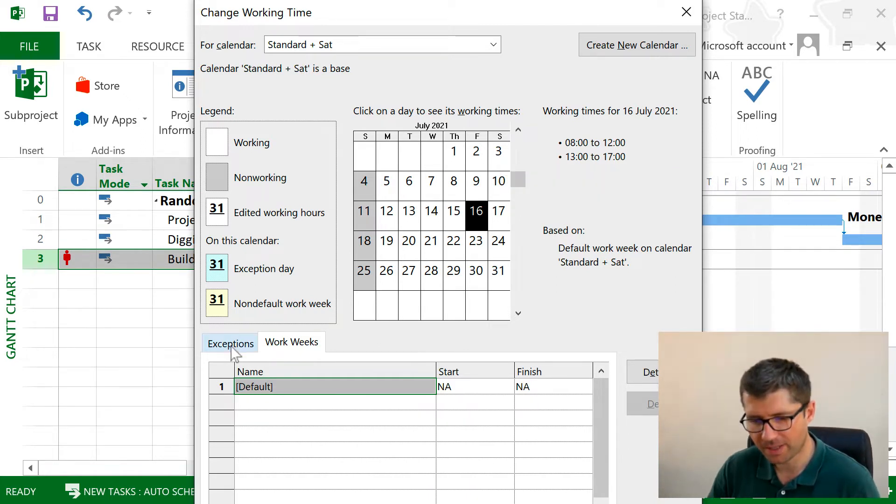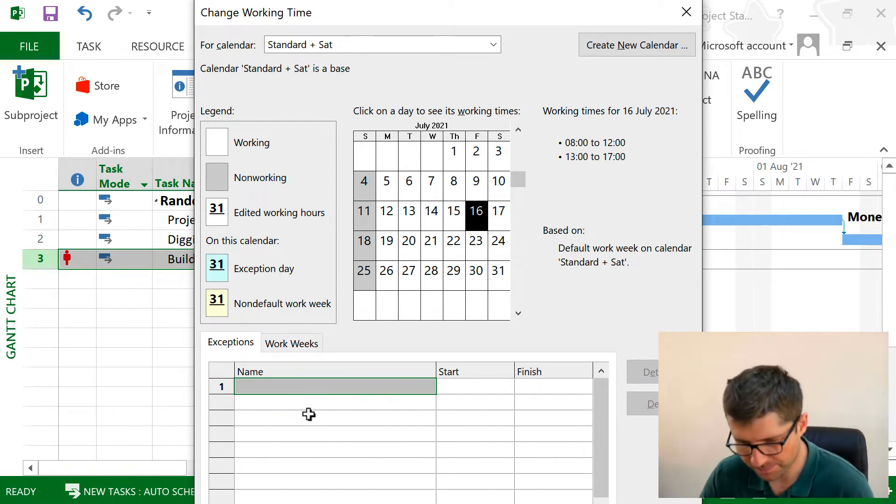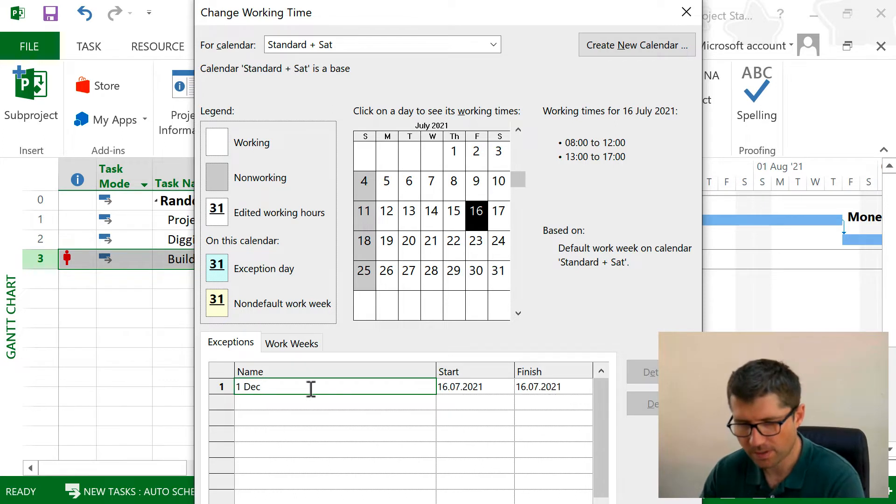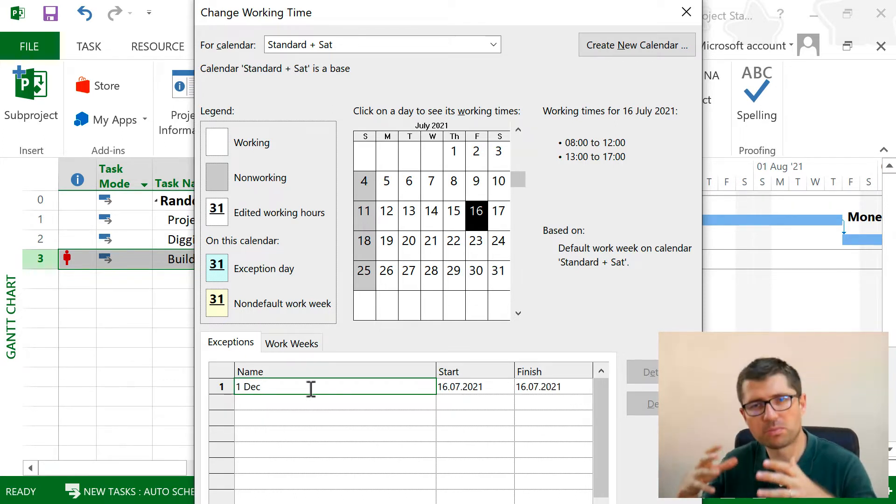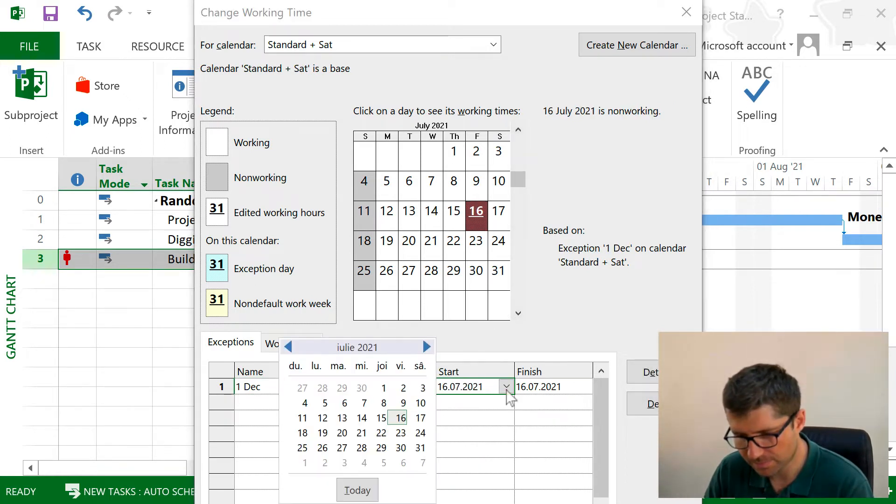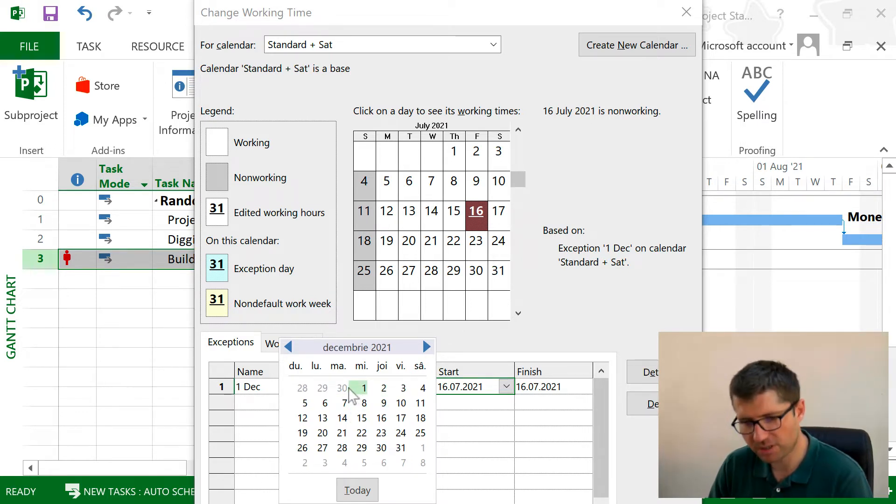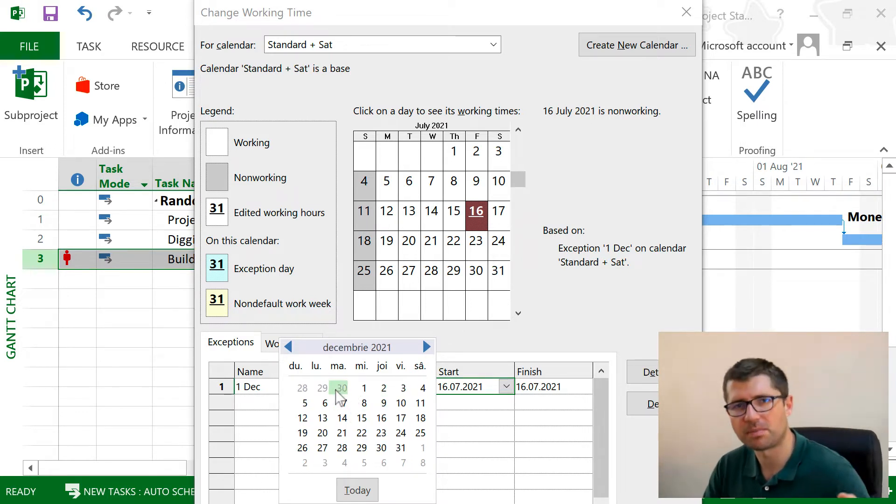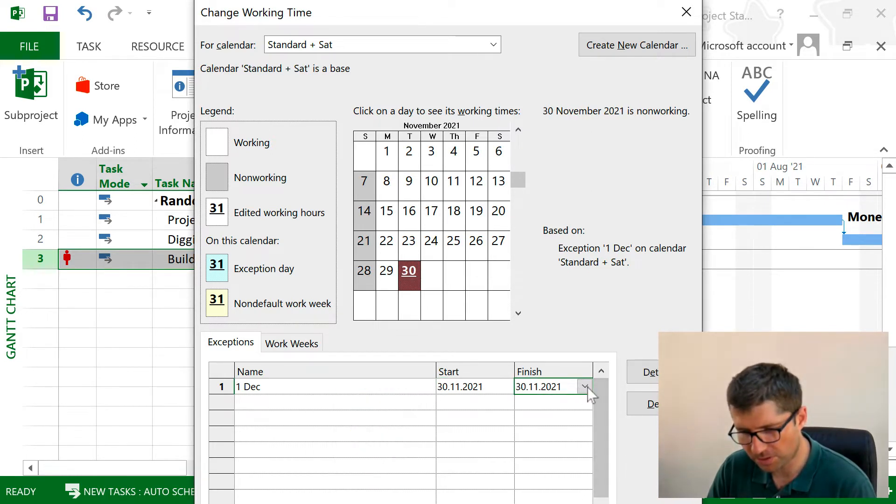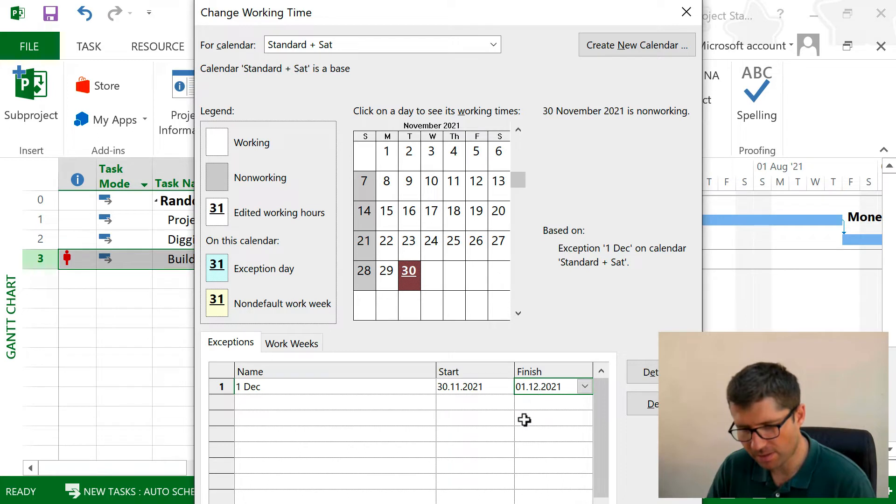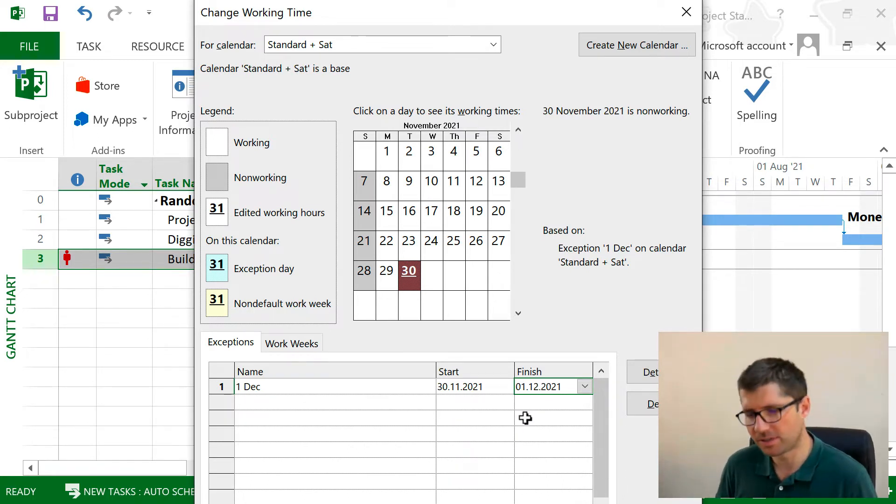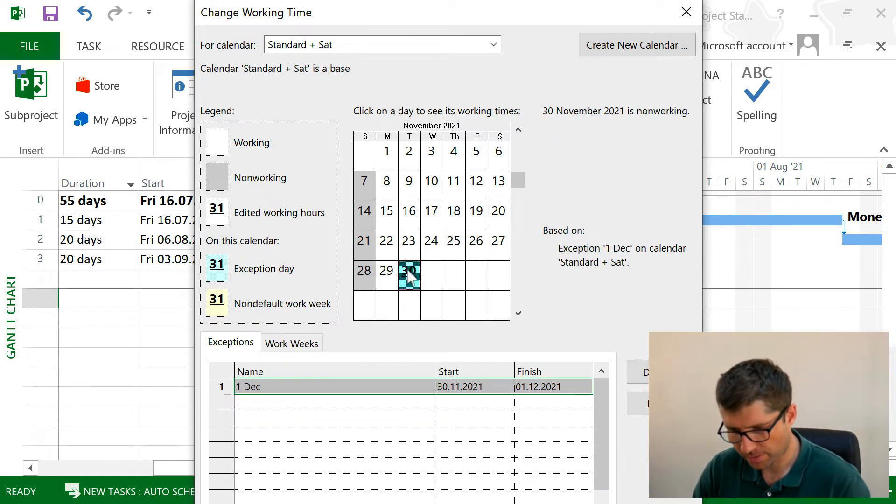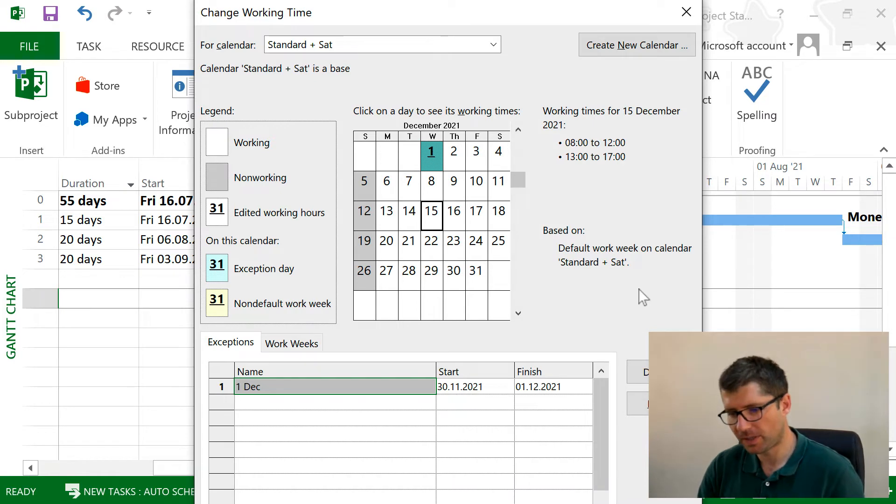The second one is to take into account the bank holidays. For example, in Romania, the 1st of December is a day off, so I want to make sure that this day... let's say 1st of December. I'm gonna put here two days of non-working time, 30th and the 1st. So this is how you can also set bank holidays for your project, and we also see this highlighted here.